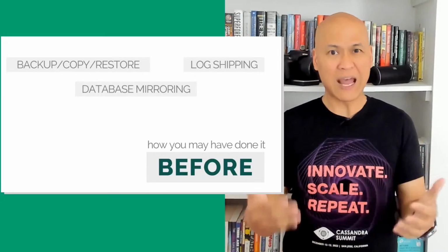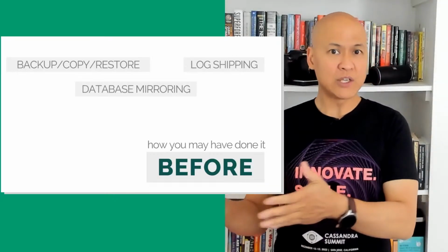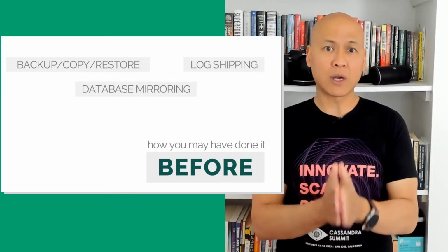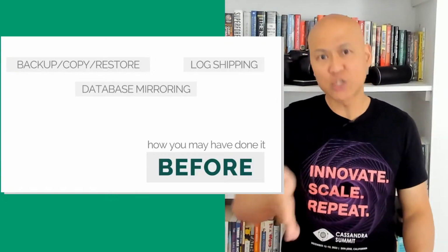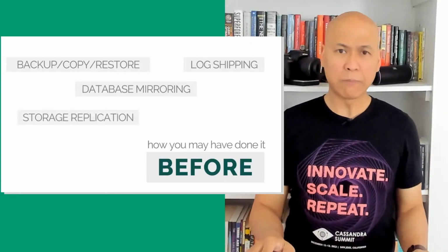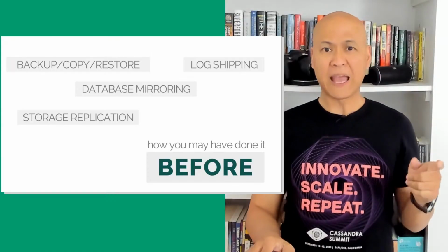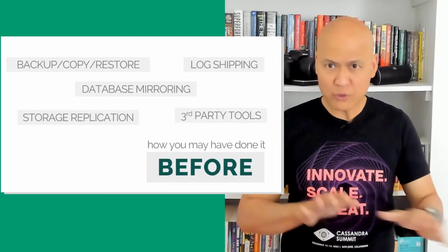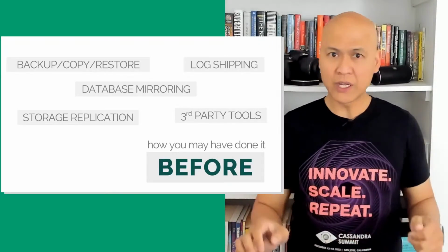So again, a strategy there is making sure that as you're doing the upgrade and migration, you're keeping as close as possible to your already existing recovery point, recovery time objectives, and SLA, while also having the high availability solution the minute that you cut over to production. That's a challenge, right? Or using storage-based replication if your underlying enterprise storage subsystem has that capability, or using third-party tools. But again, the strategy there is considering all of the things that we've already looked into.